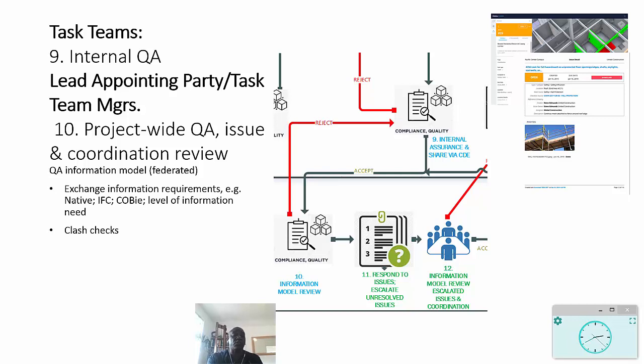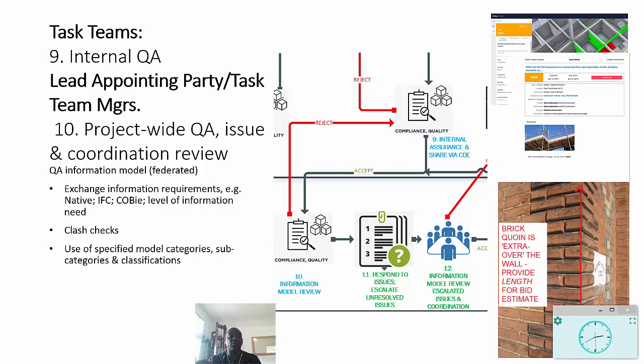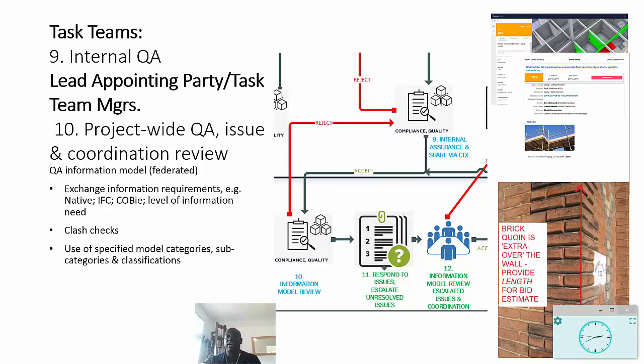So what they're looking for there are the usual QA checks, including clashes, but also how have you used the specified model categories to interpret the information that you're creating? So things like in this case you can see a brick quoin, and this is normally measured as extra over the wall that's positioned in, but you do need the length, and therefore it needs to be modeled so that you can extract the length data from it. And that's what I mean by categories and subcategories and classifications to do that.